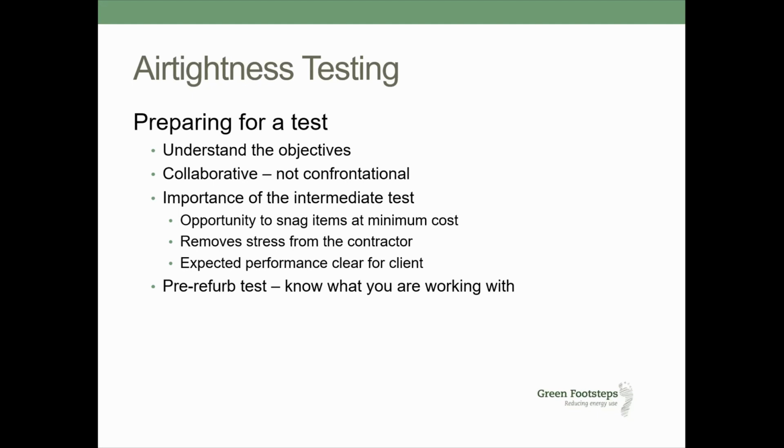By having the intermediate test, it removes the stress from you as a contractor, and it avoids the client coming back at a later stage saying it's not performing, whereas actually what they're doing is just putting their heating on more. So you've got a measured point for the building.